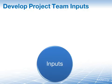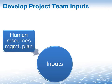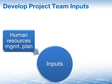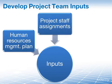We have three inputs to the process and we're just going to review them right here on this slide. First of all, we have the Human Resources Management Plan. Why do you need it as an input? This plan defines team management approaches that you can employ. For example, if you would like to do a team building exercise that includes a stay in a hotel, the Human Resources Management Plan will tell you if that is possible. It will also tell you what your strategies for training are — will you send team members to individual seminars, or bring trainers on site so that everyone participates? That kind of information is defined in the plan.